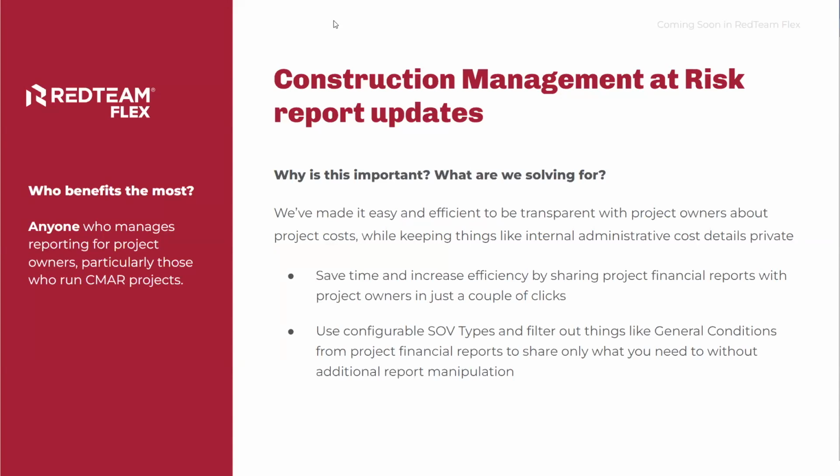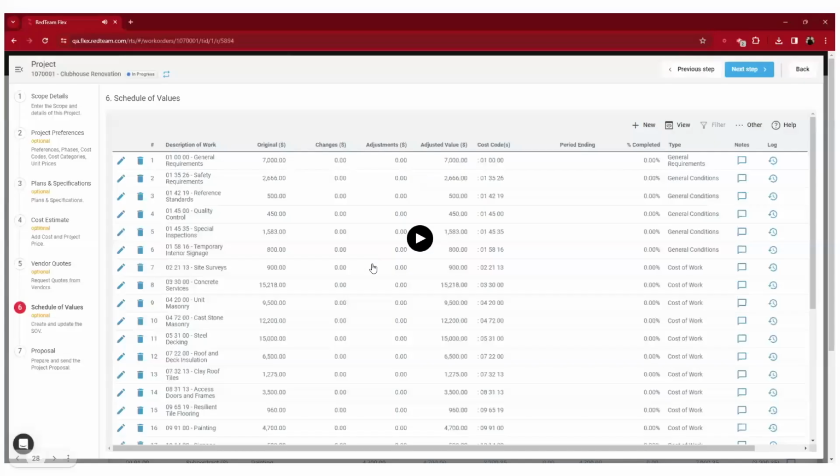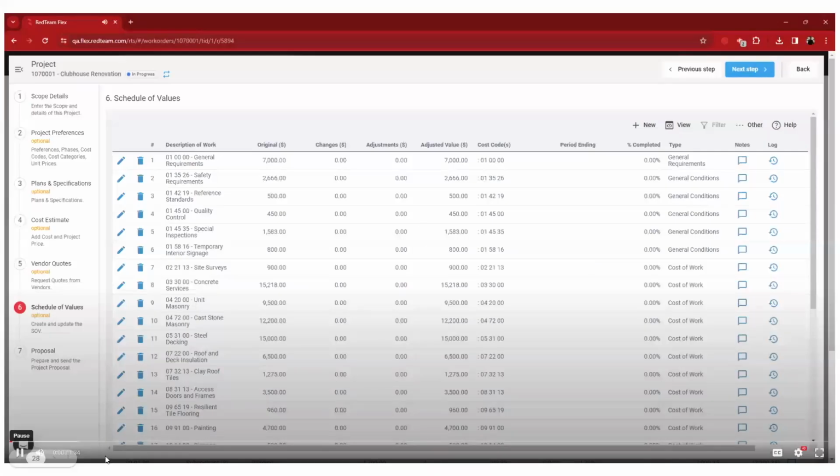So it's a great tool to review with your project owners. You can look at the expected outcome by comparing the projected contract value against the estimate at complete. Very useful. Again, you need to make sure that if you want access to this report, you elect to link your SOV to budget during project setup. And I think we've got another little video here to just demonstrate that ability to filter.